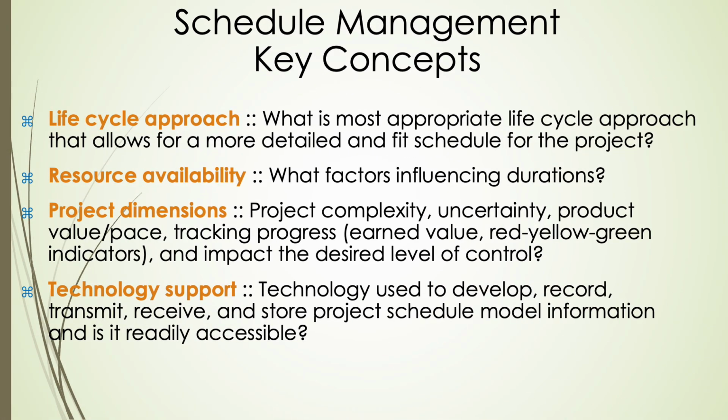For projects with high uncertainty or evolving requirements, an adaptive lifecycle offers flexibility, allowing detailed scheduling in sprints while accommodating changes. For stable, well-defined projects, a predictive approach ensures rigor with phased gates. Hybrid models blend both, ideal for balancing clarity on core deliverables with flexibility for emergent tasks.